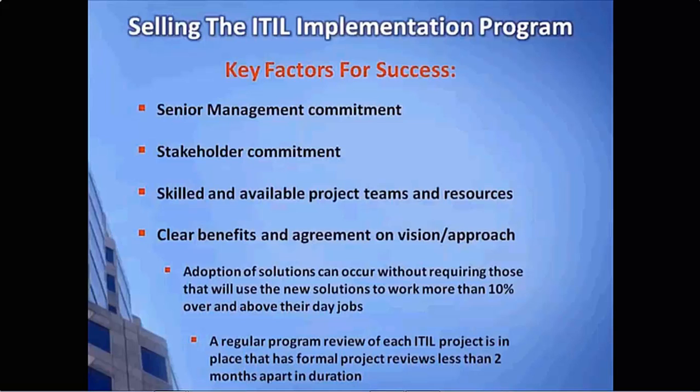In order for them to learn and adopt the new incident management process, they're going to have to participate in terms of understanding how that process works. There may be training for them to learn that new process. There may be a new tool that they have to use. That will take some of their time away from what they normally work on a day-to-day basis. Experience has shown, and certainly the Boston Consulting study showed, that if they need more than 10% of their hours spent learning all those new things above their day job, you may encounter a lot of resistance.